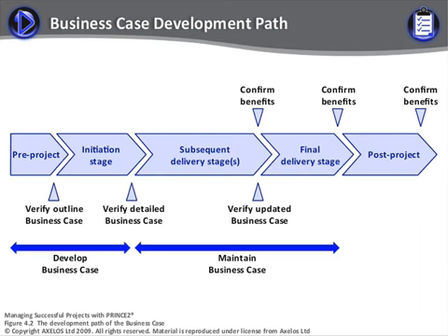The project manager will have been keeping the benefits review plan up to date and in step with the business case as changes have been needed during the project. When the project board authorizes project closure at the end of the project, this should be approved by the executive and by corporate or program management and handed over to the relevant business units. The content of the business case is covered in the next lesson.